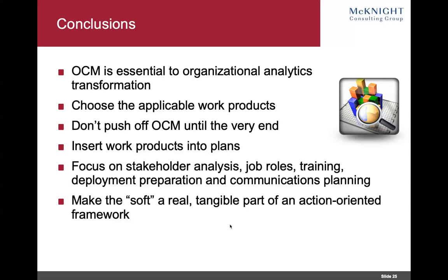Insert work products into your plans — be that an agile backlog, be that the project plan, whatever it is you're doing. Focus on these key ones: if you forget everything else, do these things — stakeholder analysis, job roles, training, deployment preparation, and communications planning. Back to my bare minimum slide — make sure that you do all of that for these projects. Because analytics projects, data lake projects, data science projects are going to be highly impactful to the organization.